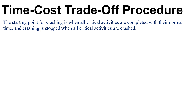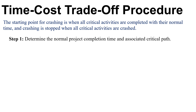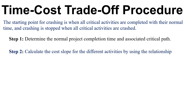Let us see the procedure step by step. The first step is to determine the normal project completion time associated with the critical path. Step 2 is to calculate the cost slope for the different activities using the following relation: cost slope equals crash cost minus normal cost, divided by normal time minus crash time.